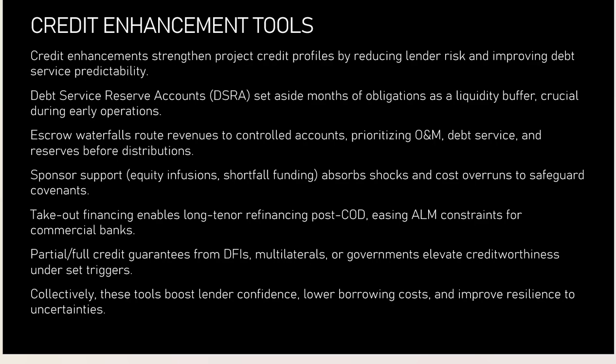One of the most common tools is the debt service reserve account, DSRA, which requires setting aside several months of debt obligation to act as a liquidity buffer in case of temporary cash flow disruption. This mechanism is especially critical during early operational years, when stabilization issues may affect the reliability and consistency. The escrow mechanism gives the lender control over the cash inflow and outflow by channeling all project revenue into a tightly monitored account structure, prioritizing allocation for operations, maintenance, debt servicing, and reserves before any